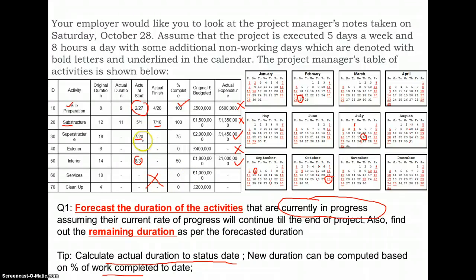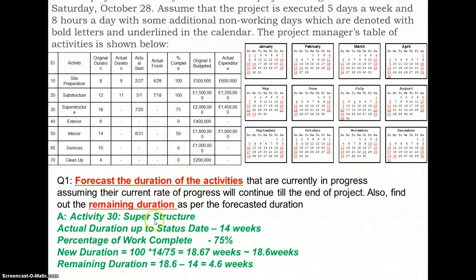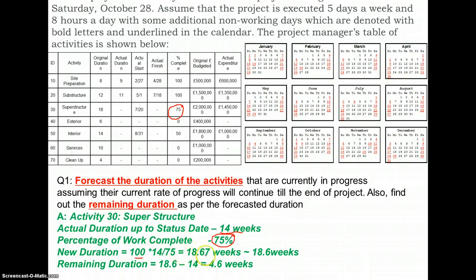We have calculated that the actual duration up to the status date has been 14 weeks. From the project data, within those 14 weeks we have delivered 75% of the work. So if 75% of the work is delivered in 14 weeks, 100% of the work would be delivered in — by simple proportion — 18.6 weeks. Of those 18.6 weeks, 14 have already elapsed, so 4.6 weeks are remaining. As we are reporting progress on 28th of October, this activity will take almost four and a half more weeks.